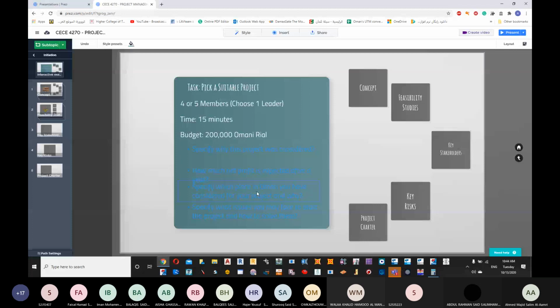So here, at this time where we are talking about initiation, you are not required to do the analysis of stakeholders. You are only required to know who the basic stakeholders are, who the key stakeholders are. For example, in a restaurant, I need to know the competitors. I need to know who will be my customers. I need to know the building owner or the tenants. I need to know, for example, the suppliers. These are key stakeholders for me, and I need to know the workers. Okay, these are the key stakeholders which will be affecting where I'm going to put my restaurant. Are we clear?